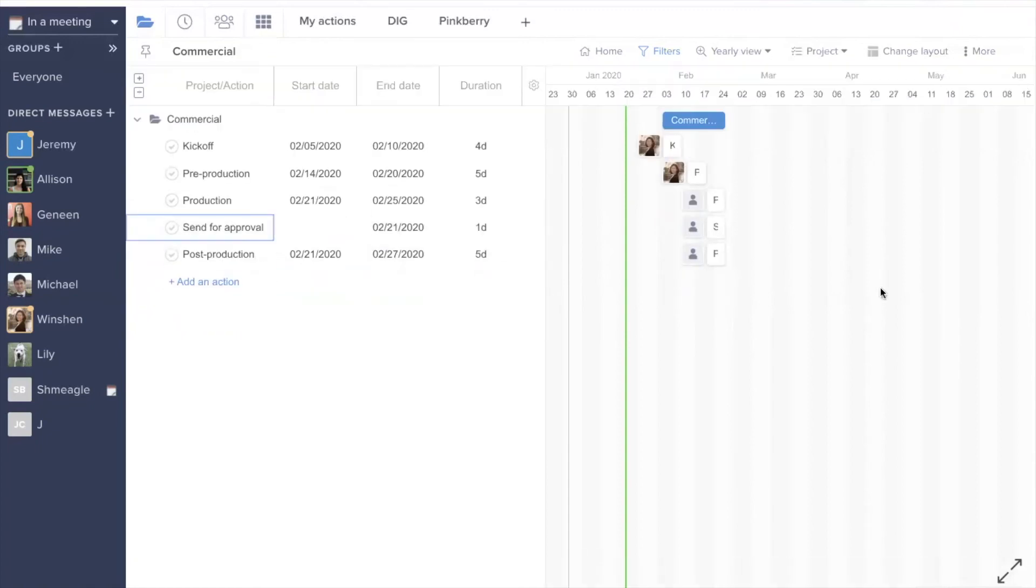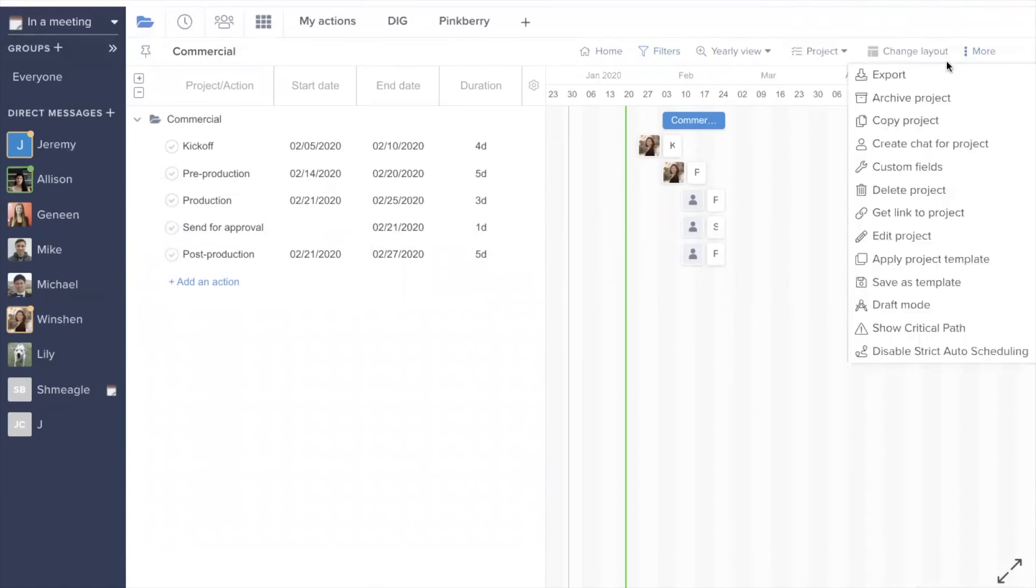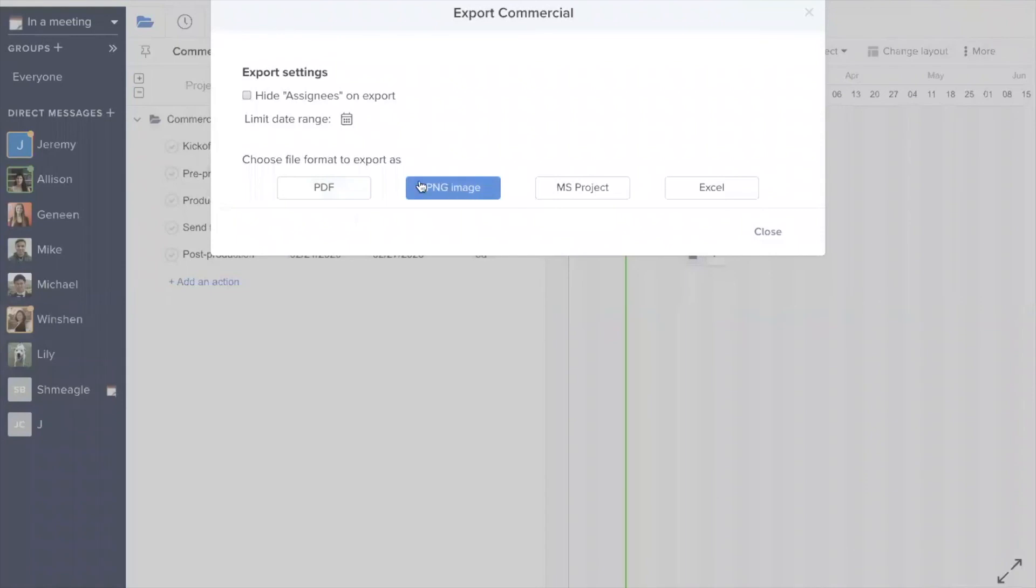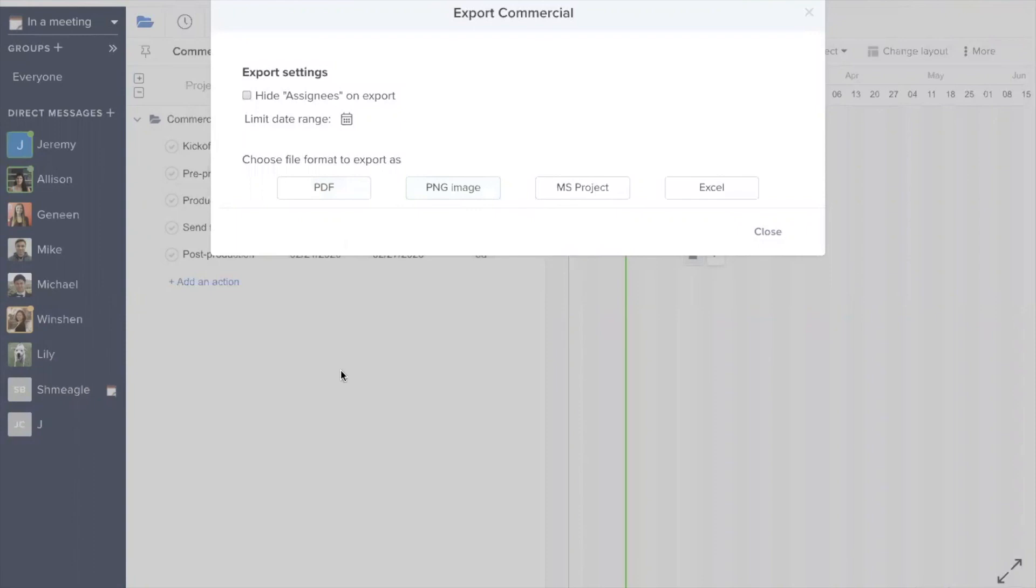If you then would like to export the Gantt view to a PDF, you can go to the more option, choose export, and then you can select the type of file format you'd like to view your project in. In this case, PDF or PNG will probably be the most useful, and that's actually going to retain all of the information that you see on the screen. So for example, if you've selected to include status or duration on that left panel, the PDF and PNG will then include that information in the export as well.